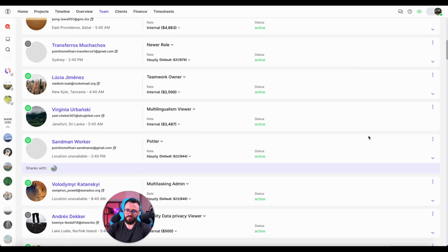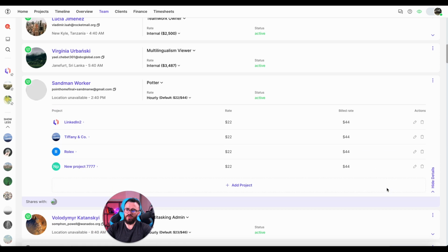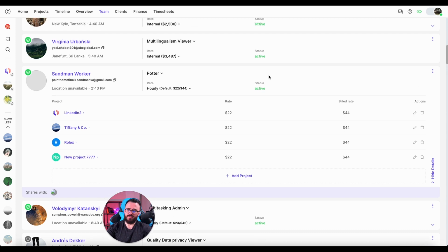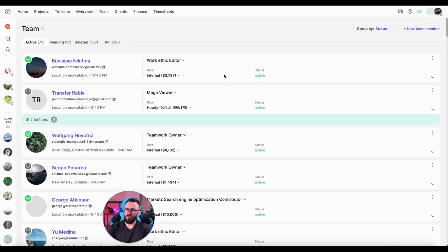That means, I'm showing a bigger example of a team from another demo account. So here, let's say I had a worker who worked with these rates, and then I promoted him or her later on the road. Our statistics won't be corrupted by this, so it won't update the rates backdated. I preserve historical information, and in the future we can add more charts showing how a specific team member performed, how he grew with the rates, and maybe some other performance metrics.